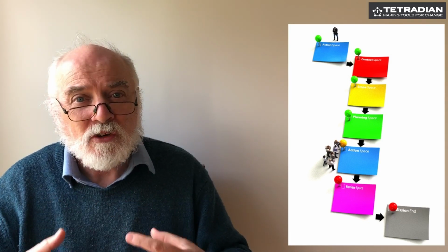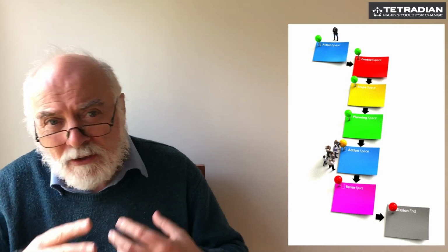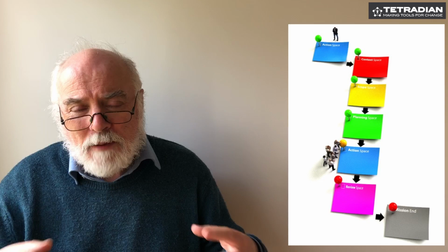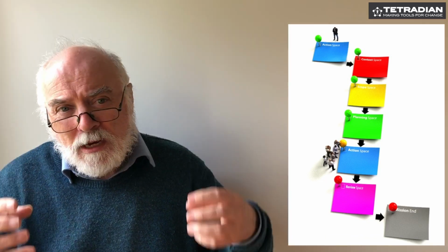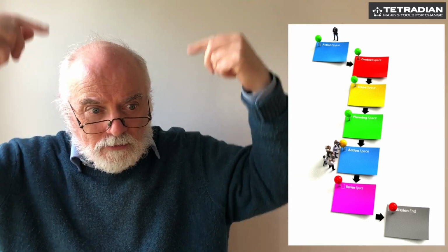We've also got the start and end conditions. One of the common traps is that people know when to start, but they don't know when to end, particularly if there's no obvious endpoint. So we need to identify what the signals are that tell us when to start and when to end. That's what we work on in the plan. Now, in the action, we're going to do the actions that are specified in the plan. But we're also going to have to capture information arising, because without that information we have nothing to learn from, nothing to build, nothing to renew, nothing to reassess. That information is absolutely crucial, and we need to set up how that information capture is going to be done and what we're going to capture in the plan phase, linked back to the scope, linked back to the context.